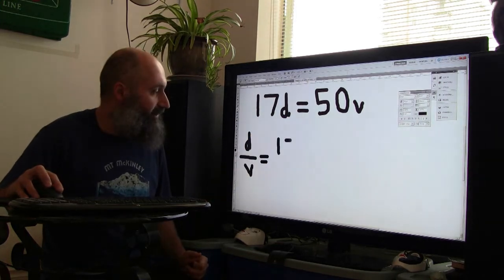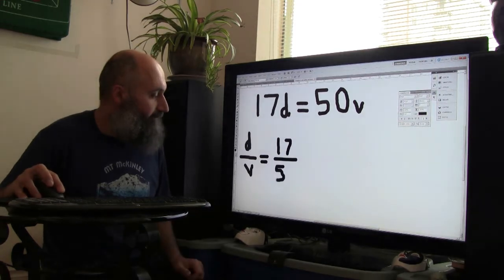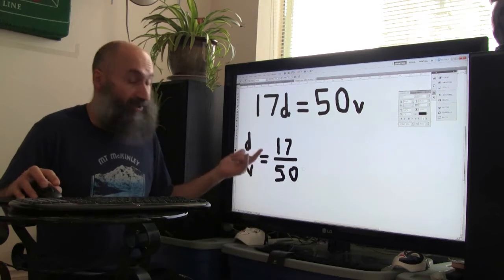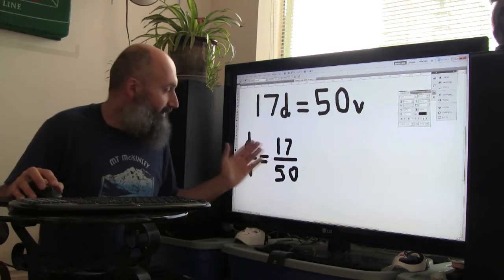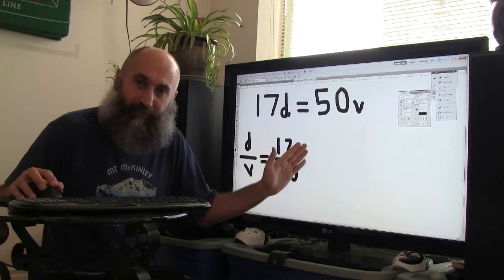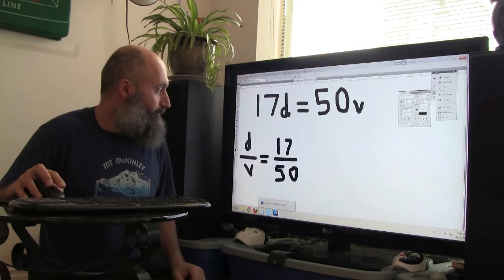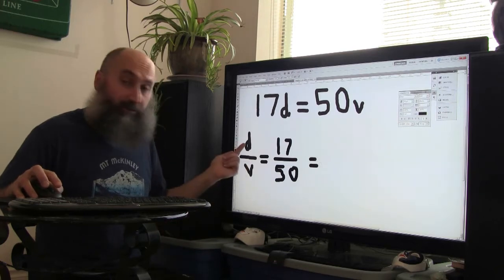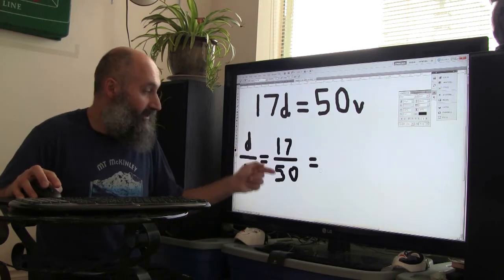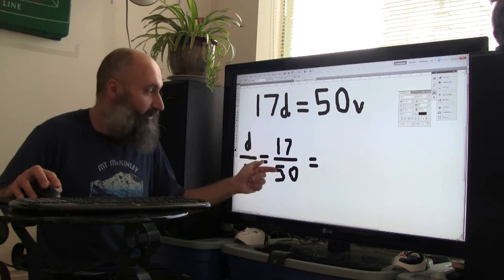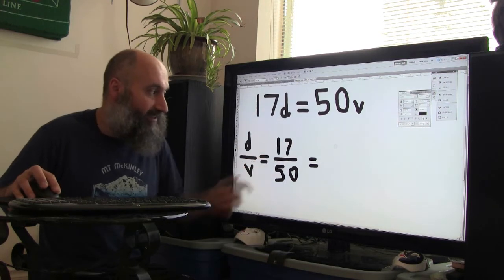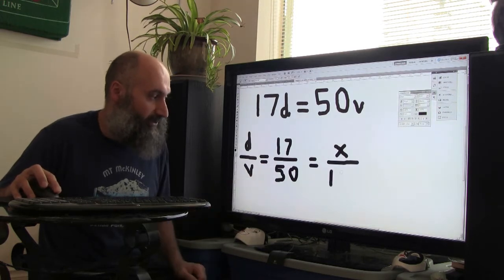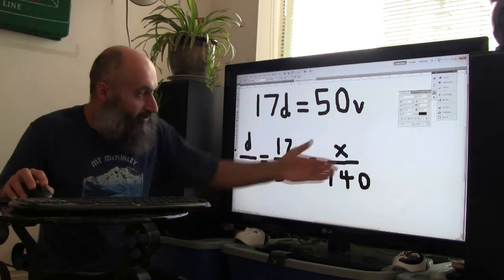So 17 days, I'm going to put 17 up here, divided by 50 videos, and that's my anchor ratio. I'm going to use this because I'm going to assume for now that I'm going to continue at the pace that I've been going, okay? So days on top, videos on the bottom: 17 to 50, right? 17 days to do 50 videos. Now I need to figure out how many days, I'm going to call this X, it's going to take me to do 140 videos, right?